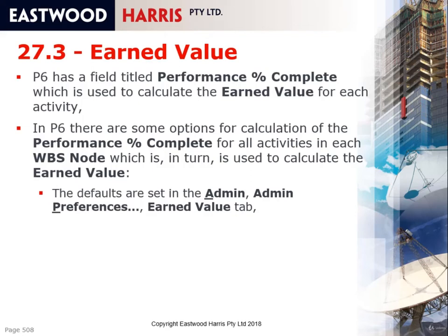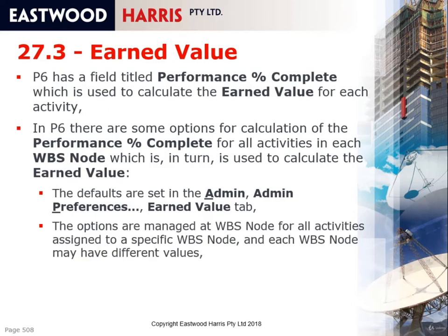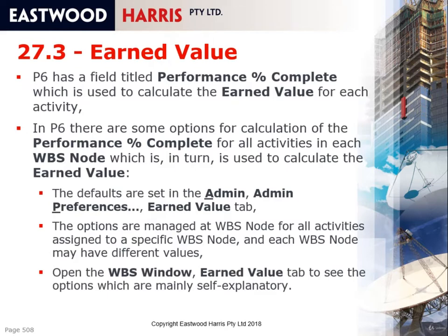The defaults for the Performance Percent Complete calculation for each WBS node are set in Admin Preferences, and the options are managed at the WBS node level. Each time you create a WBS node, it copies the defaults set in Admin Preferences, and then you can change them for each WBS node. Once you open the WBS window you can see the options, which are self-explanatory, and we're going to have a look at those now.